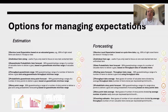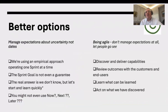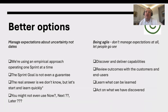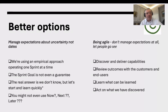Better options include managing expectations about uncertainty rather than dates. You could say you're using an empirical approach, operating one sprint at a time — the sprint goal is not even a guarantee. Or use now/next/later. Or be truly agile: don't manage expectations at all, discover and deliver capabilities, review customer outcomes, learn what can be learned, and act on what you discover. That's the most agile way — not knowing for sure what you'll do in the next sprint, but letting what you've learned influence where you go next.